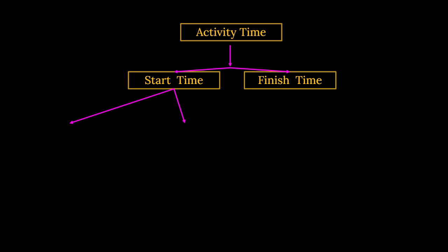Or else you can start the work after 3 days, so that on the 7th day, that means after completion of 4 days, you complete the task. These are two approaches. So you can either start early and complete it early, or you can start late and finish on the last day, the allotted day given to you. Clear?